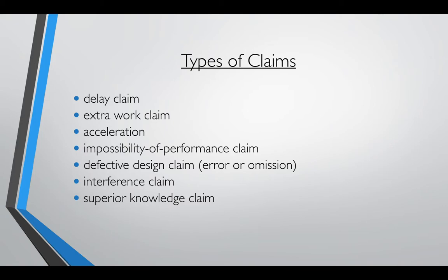An interference claim is going to be something where, say, another agency comes into the mix and starts doing work around that area, or other contractors are awarded contracts simultaneously with your contract, and that wasn't really part of the agreement. They said you were going to be the only contractor in the vicinity, and now you have others, so you could file an interference claim.